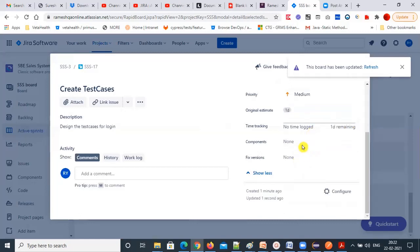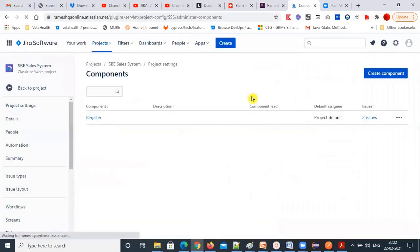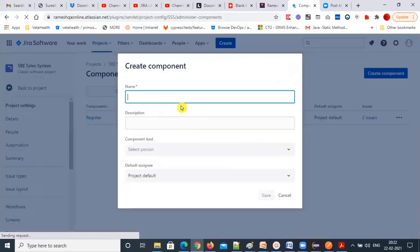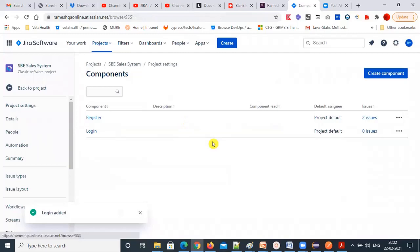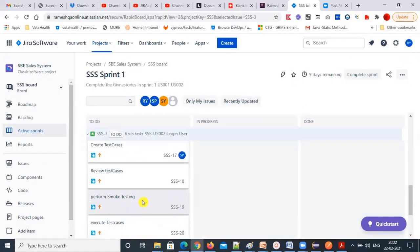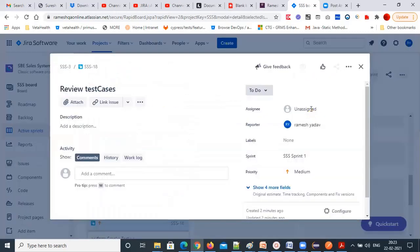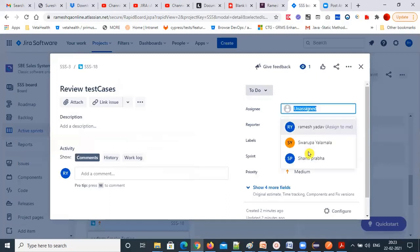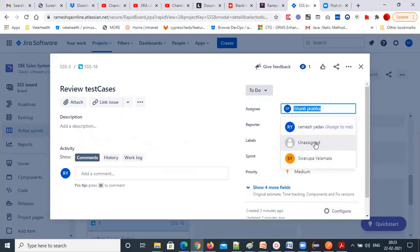We also have components. We need to create a 'login component.' Components are modules — you can create a component for it. In the developer task also, you can add this. For 'review the test cases' for login, assign the review to someone other than the person who prepared them — review should be done by a different person.